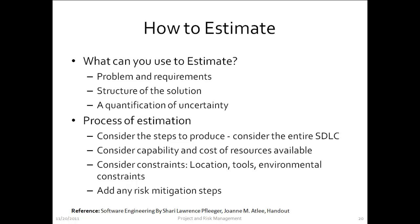What parameters can you use for estimation? You can use the problem description and any requirements of the software system. For example, you could look at the problem being solved and consider whether the software system is simple or complex — adding more time for a complex system. Or you could go use case by use case, estimate what implementing each use case might take, and add them all up. In both cases, you're using a definition of the problem and the requirements to do your estimation.